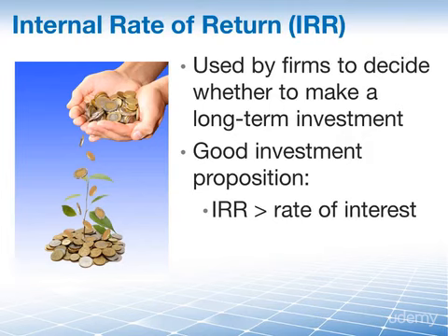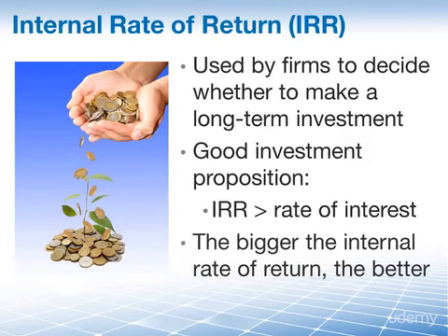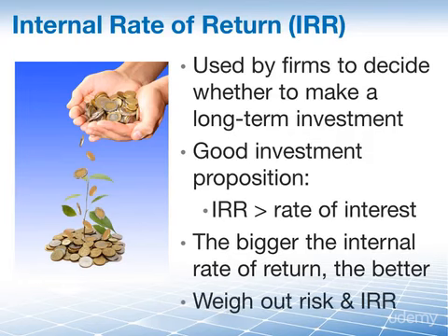Just remember, all else being equal, the investment with the bigger IRR is the better investment. There are alternative investment choices out there; you are not limited to investing your money in the bank. These different alternatives have different rates of return and different risks associated with them. So amongst your alternatives, when looking purely in terms of the IRR, you should always choose the investment with the highest IRR. Realistically, you would also need to consider risk and weigh risk versus return in making your investment choices.